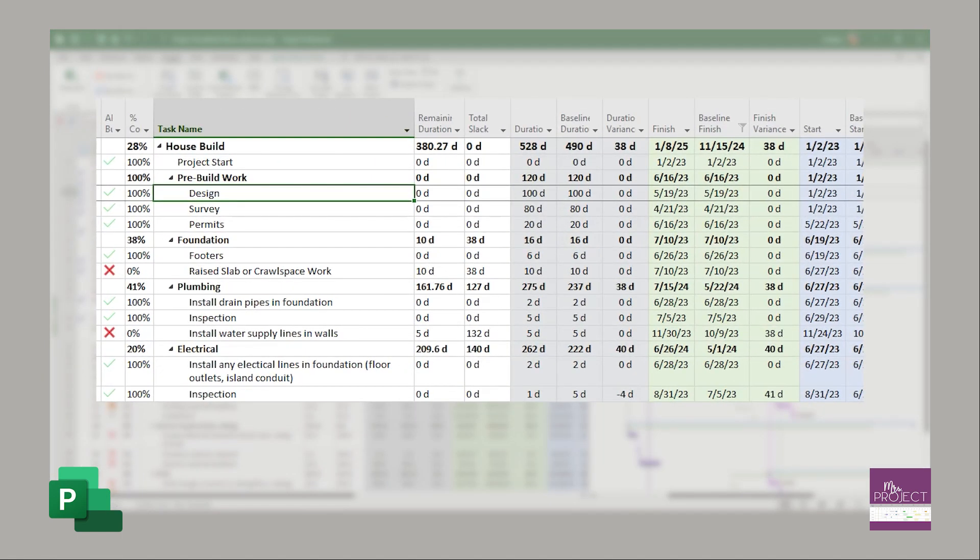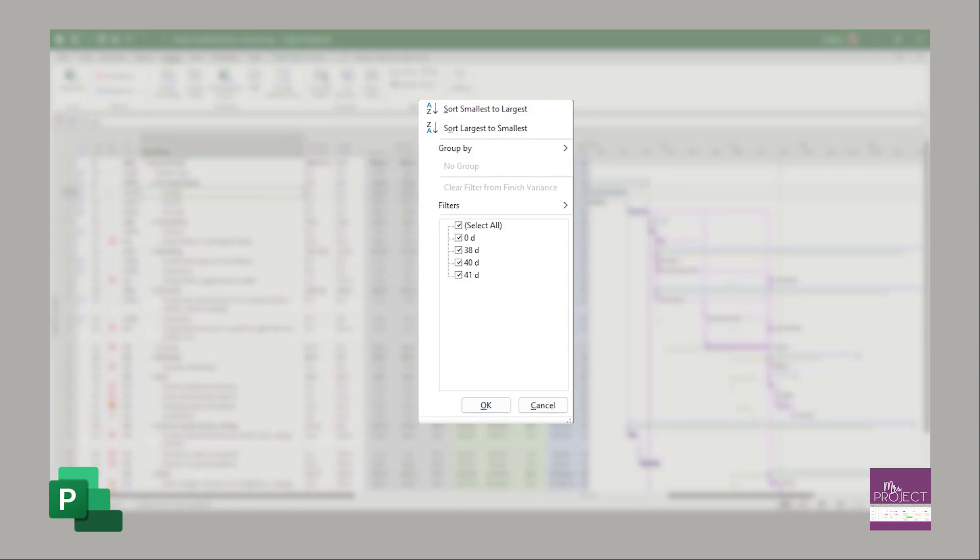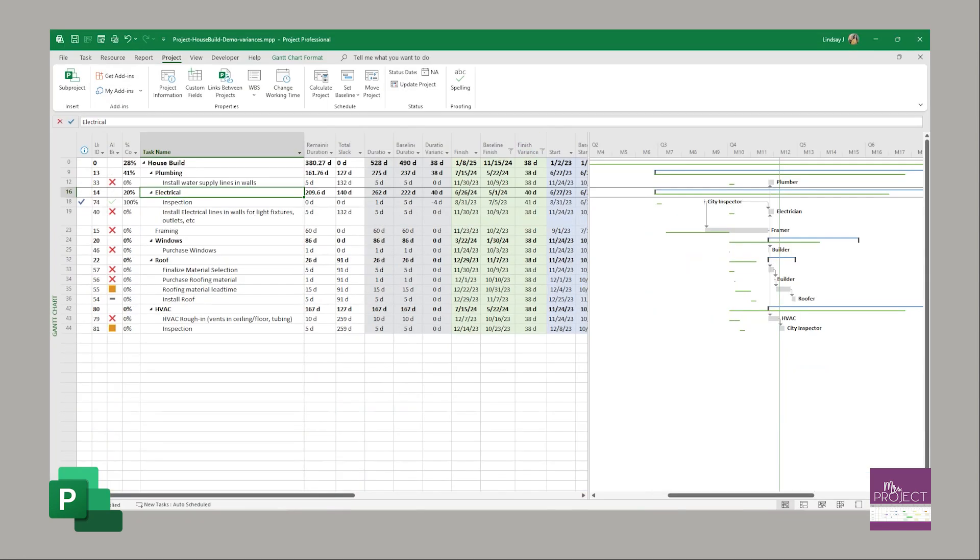Then you're going to look at the finish variance. This is important too because you also need to be keeping your projected finish up to date. You can see I have a couple of things that are behind, so I need to update those first. This metric will look at whether you have finished or behind tasks - it doesn't matter, it doesn't exclude. Then we're going to look at the finish variance and filter on anything that is not zero. Sometimes you might have some negative numbers if you've pulled some tasks in, so you would unclick those as well. We're looking at just anything greater than zero. If we counted this, we would count 11. You're not looking at your summary tasks - you don't count summaries, just the actual detail tasks.